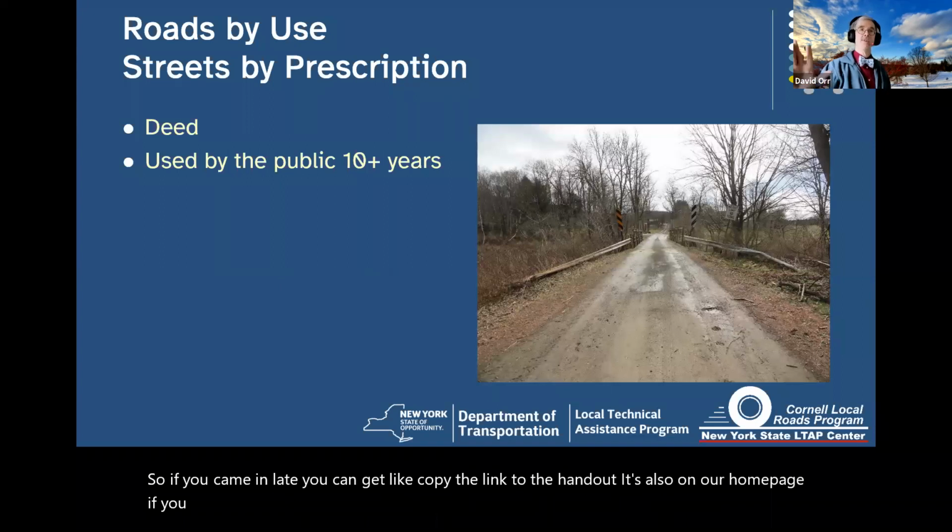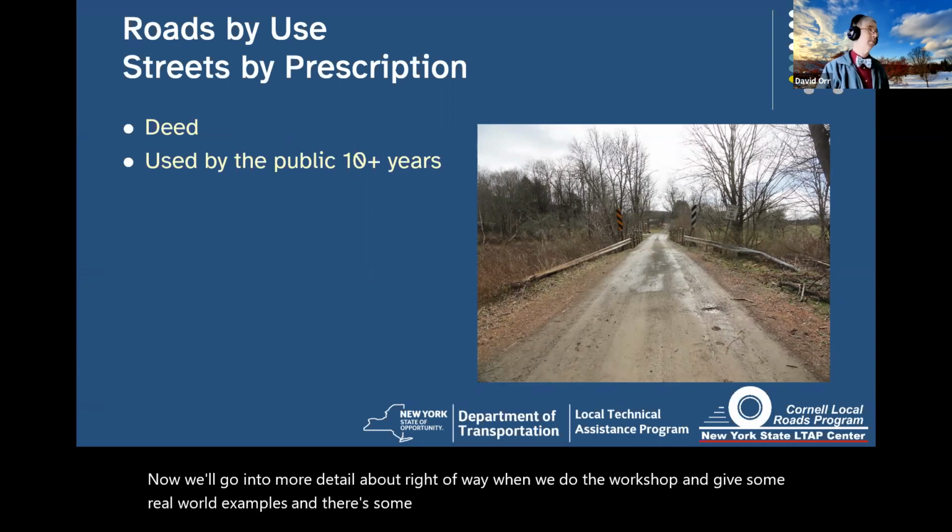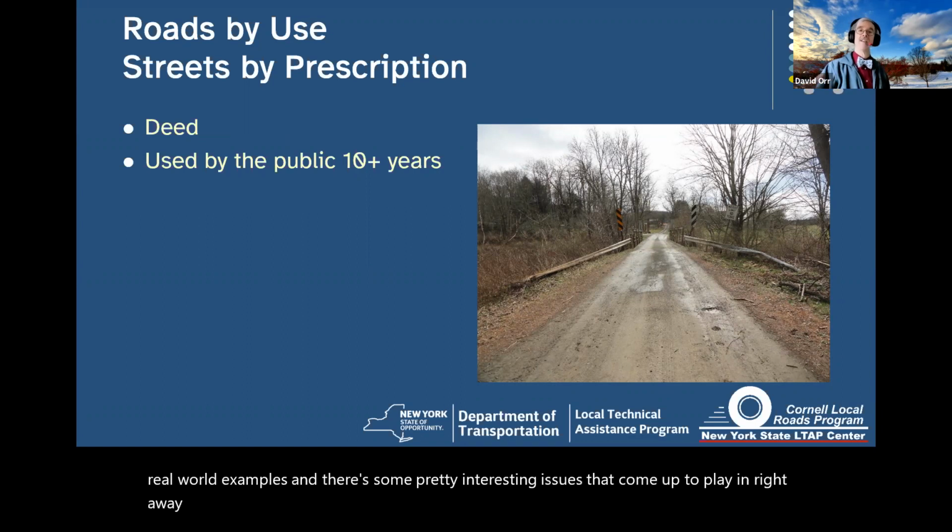Now, we'll go into more detail about right-of-way when we do the workshop and give some real-world examples. And there's some pretty interesting issues that come up to play in right-of-way. But make sure you've got the right-of-way you need. It can stop a project faster than almost anything.